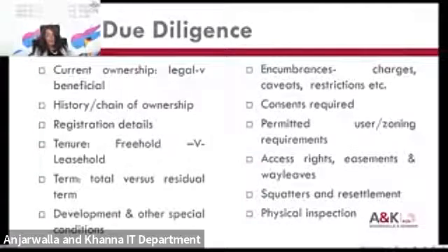Then one of the bigger issues that we see when it comes to acquiring land for infrastructure projects is sometimes for large tracts of land, you'll find that there are people who are residing and using the property, and these people do not have any registered rights in relation to the property. And the project company is then faced with the added task of having to come up with a resettlement program that then has to be approved by the relevant county and other authorities.